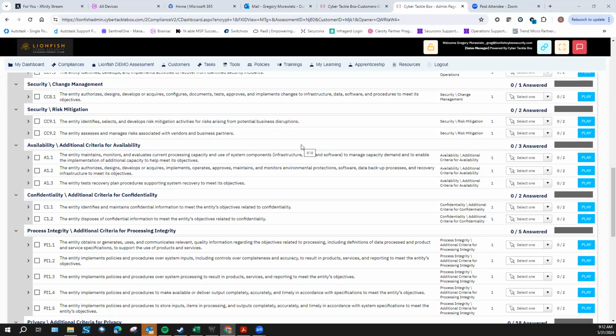And the money went down quite significantly, and they mitigated that risk by having a minimal amount of money in that bank account in order to pay staff and team members there. They didn't have a larger amount, which they normally did, to cover those things. So they just made balance transfers at a different interval. But that was an interesting risk assessment.